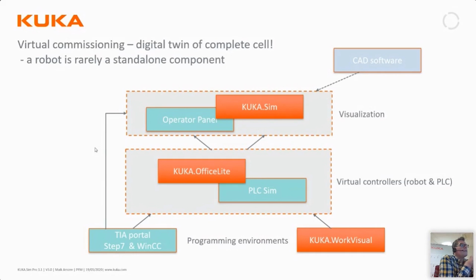Now, I've worked at a system integrator for the past 6 years, so I've built a little bit of our own experience of how we should have done it in many cases, because we usually didn't do so much simulation or testing of a cell before we actually installed it, which at the end of the day caused us high workloads, so to speak, during commissioning. We had a lot of discoveries during commissioning, which very often was not really necessary. And I've built my little reasoning example here on what we did usually.